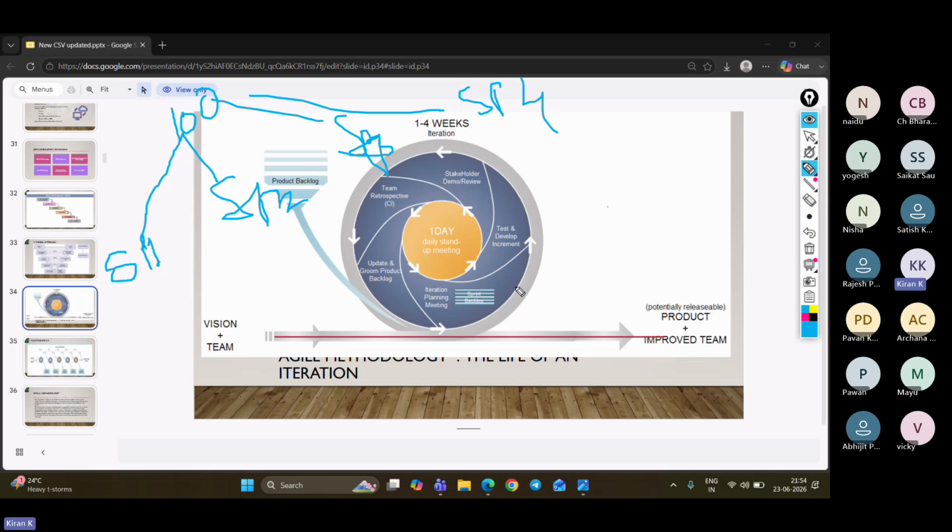So first time, we will be providing some basic features. From 100 requirements, we will be figuring out what are the basic 25 requirements for the system, or what standard features will be there for the software. Those we will be releasing in sprint one. That is going to be our software release to production. In that we will be performing the testing and verification, and everything will be documented.